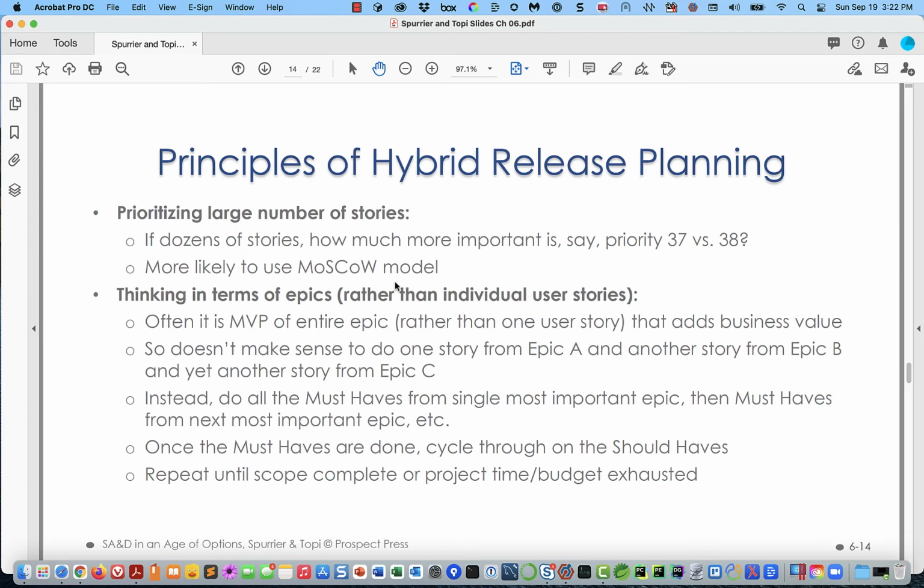So the more we're doing detailed requirements up front, the more we're building a bigger system on paper. Okay, so they have this idea that one of the potential benefits that comes from Agile is that we can wait until we're actually building parts. And as long as we build the most essential parts first, we can go back to our constituents and say, okay, we've built this for you. Now, can you see that this is all you need? This is a viable product all by itself. How about you go and use this for a while and tell us how you feel?